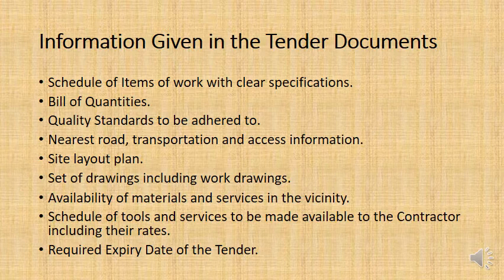A schedule of tools and services to be made available to the contractor, including their rates. Well, if there's lots of different contractors on site, all doing different contracts on the one project, they're fulfilling different work packages. Well, there's probably going to be some shared resources. There's probably going to be a site toilet, a site office and a smoko room, a place for the workers to have lunch and so forth.